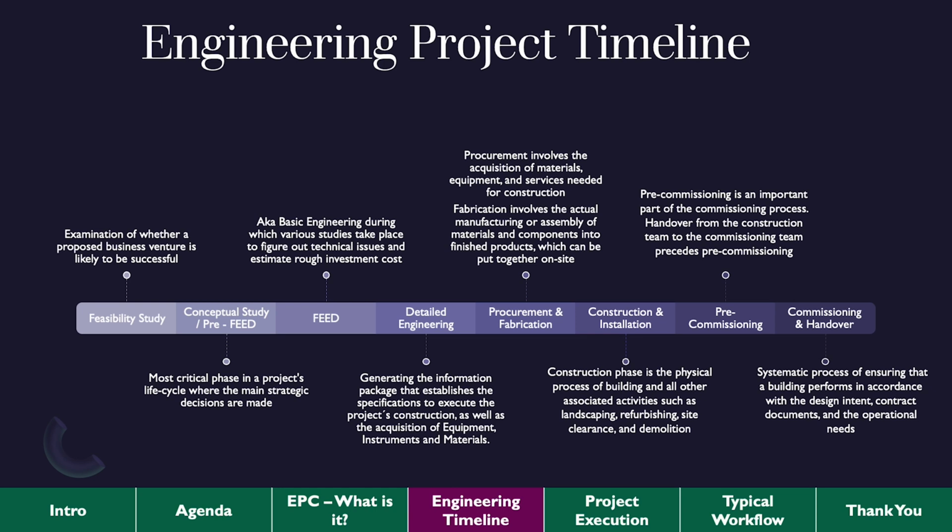One of the big mistakes we see in engineering is procurement will say, well, hey, I can get this thing cheaper in carbon steel, or maybe a bigger tube size, or maybe fewer passes. And they'll change the design and order it based on that, and then it doesn't work. Oh, coming from procurement, you mean? Procurement, yes. Well, because it's cheaper. That's the critical part. Right.